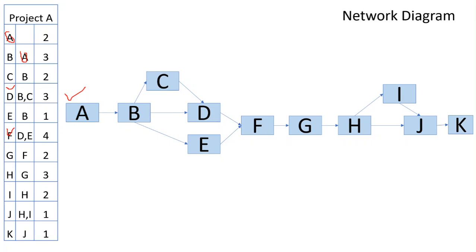But we have now calculated how much time it's going to take to survey the land, to do the trenching and flower work, to do the gardening work, to create the fence, to make the walkways. So everything is already calculated. So we are just going to assign these durations to these activities. So activity A is taking 2 days, activity B 3 days. Like this, I am assigning the days to all these activities. Now the days have been assigned to all activities.